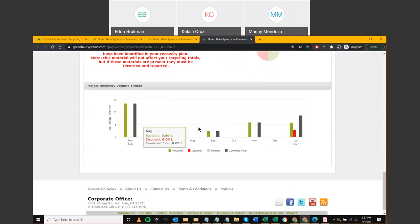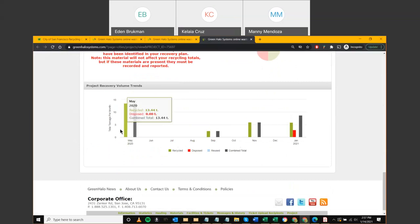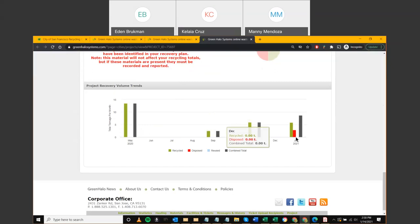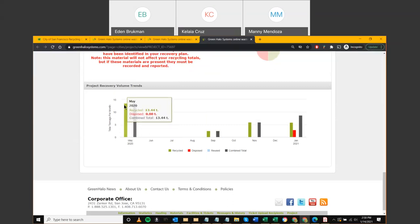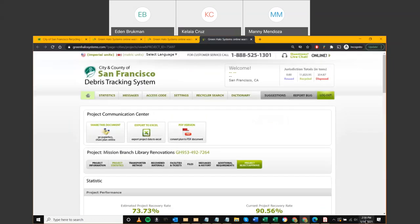With uploaded tickets, you can also see volume trends — a graph showing tonnage generated per month over the project timeline. Most projects generate the bulk of their debris early, then taper off with occasional pickups. This trend view helps you understand volume patterns across the project lifecycle. We have about 5 to 10 minutes before the Q&A session.